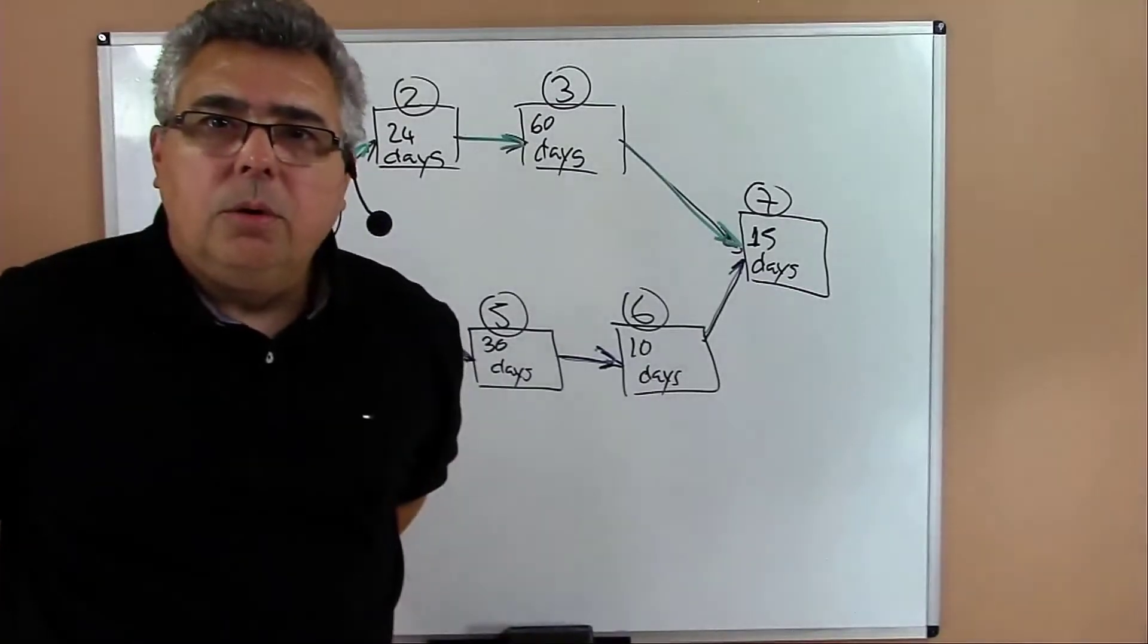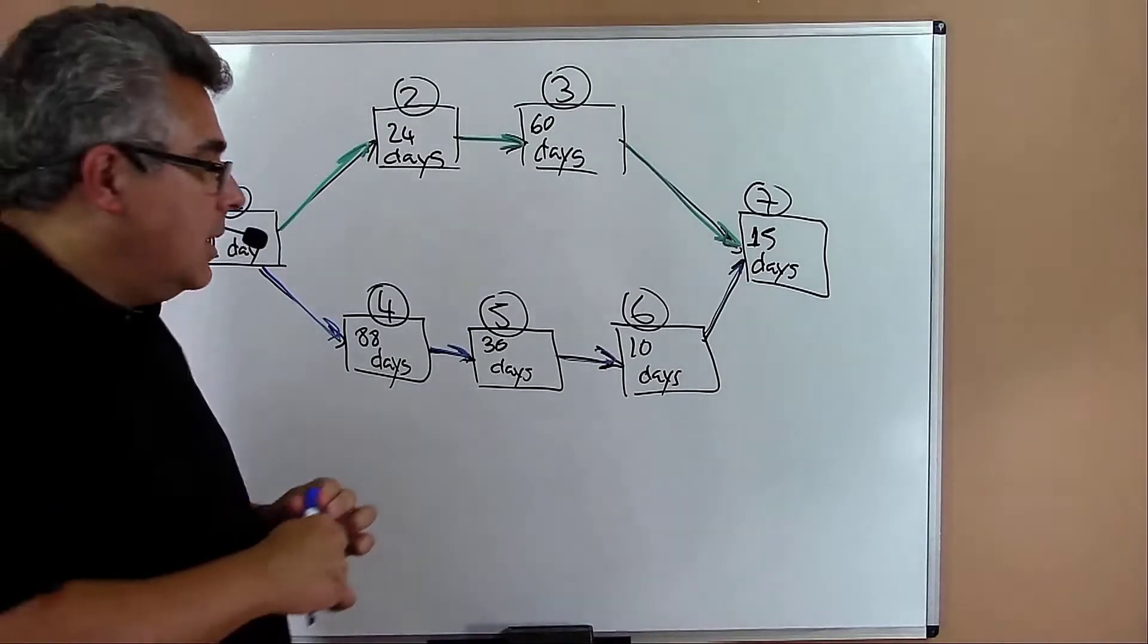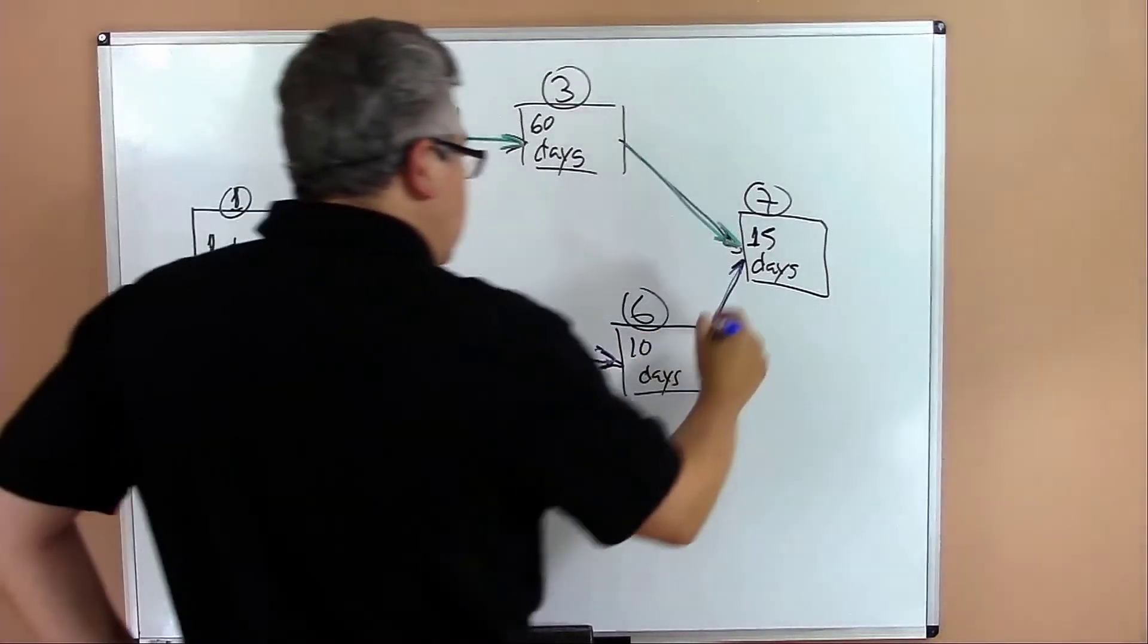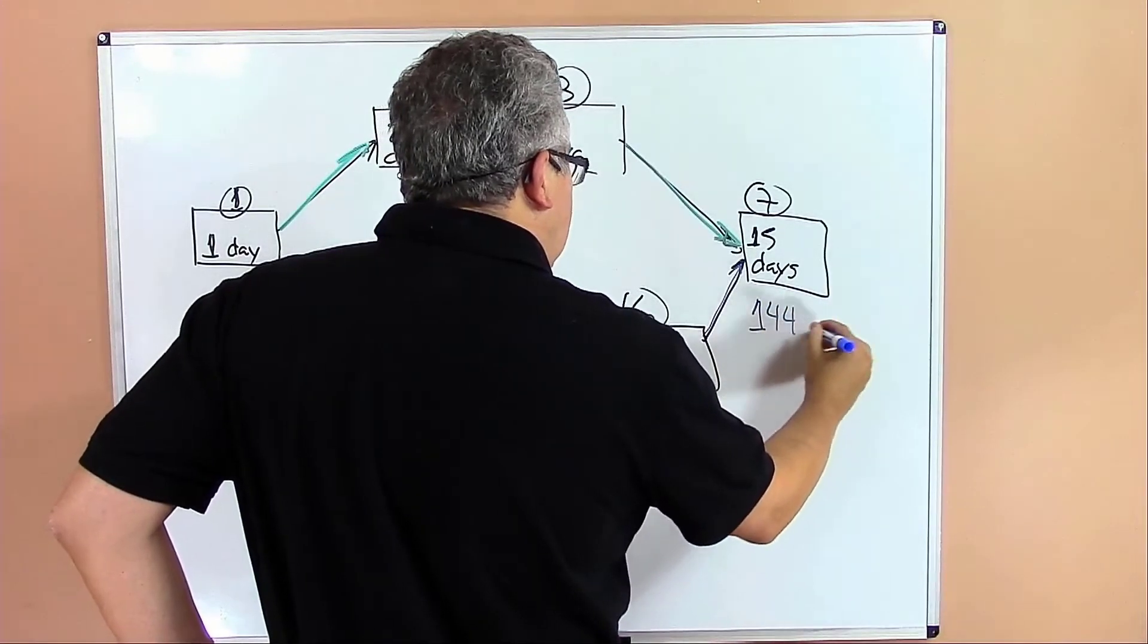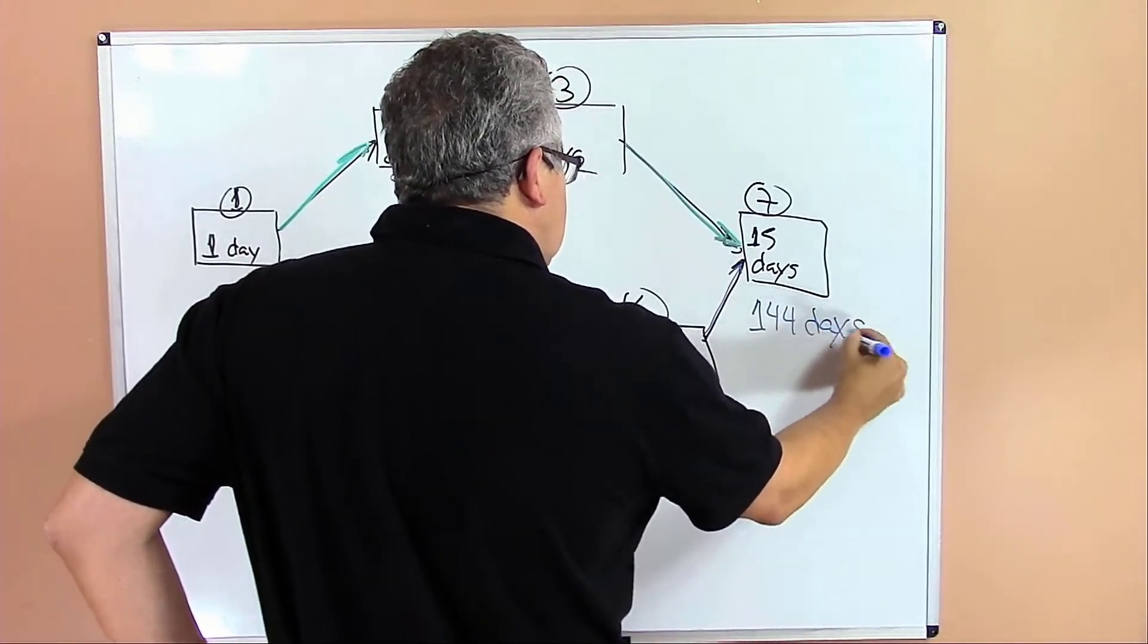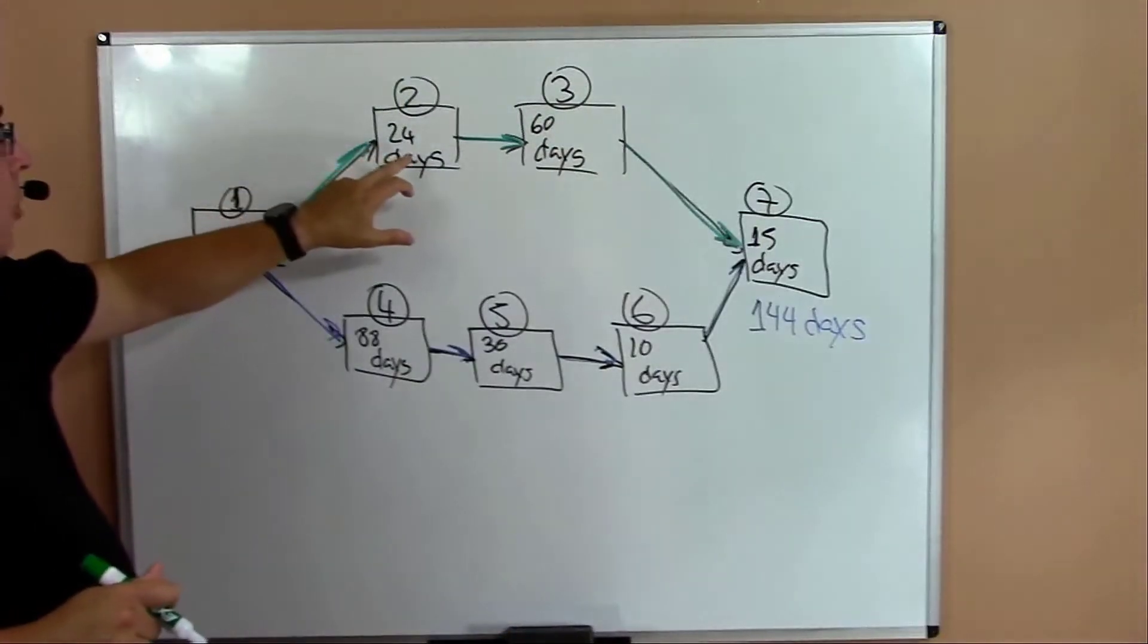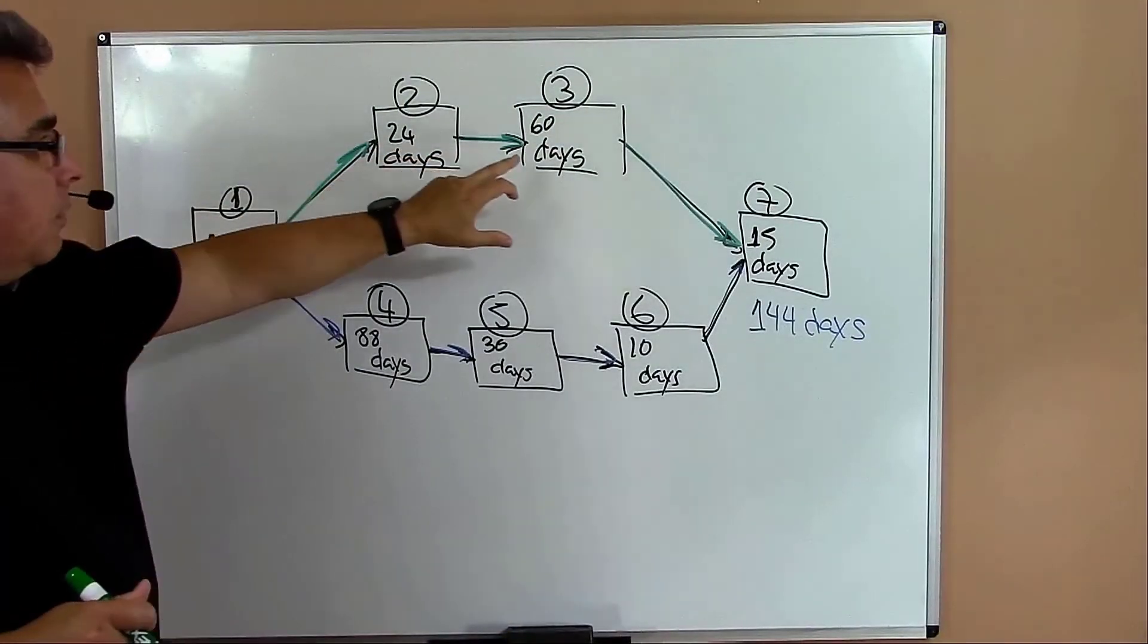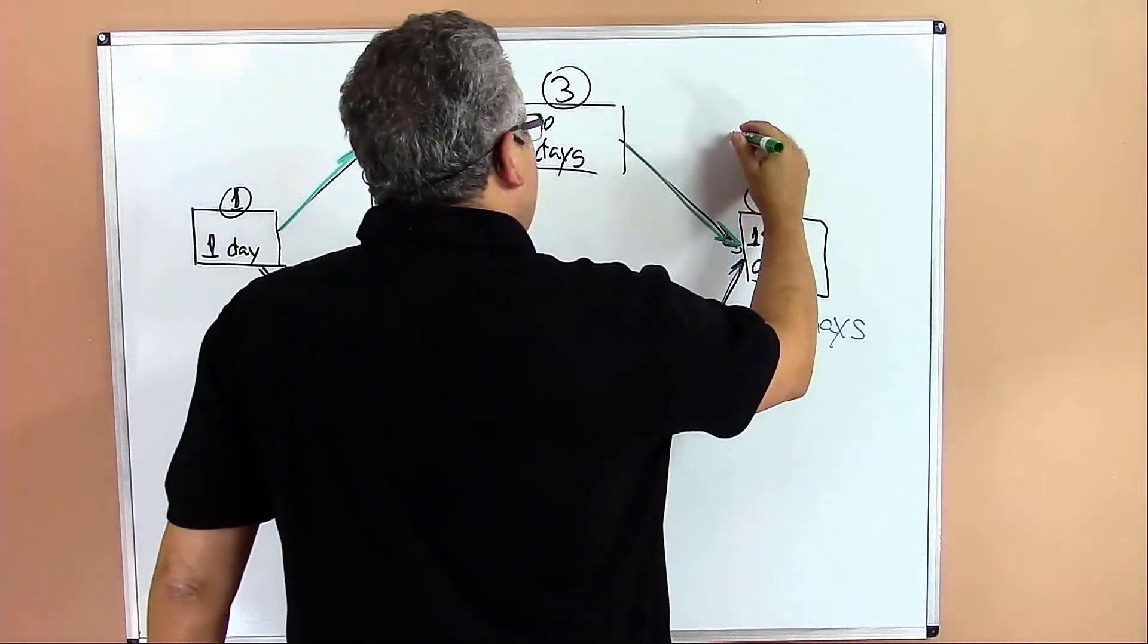One question for you: what's the duration of the project? 144, yes. So the blue path takes 144 days and the green path: 1 plus 24 is 25, plus 6 is 85, plus 15 is 100 days.